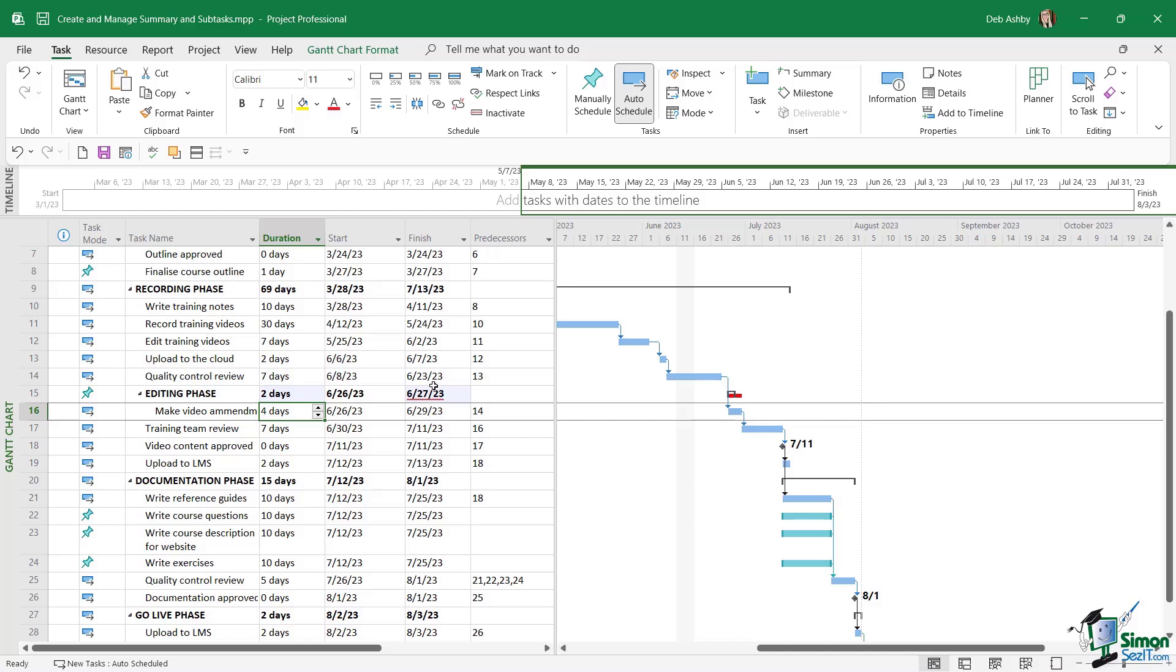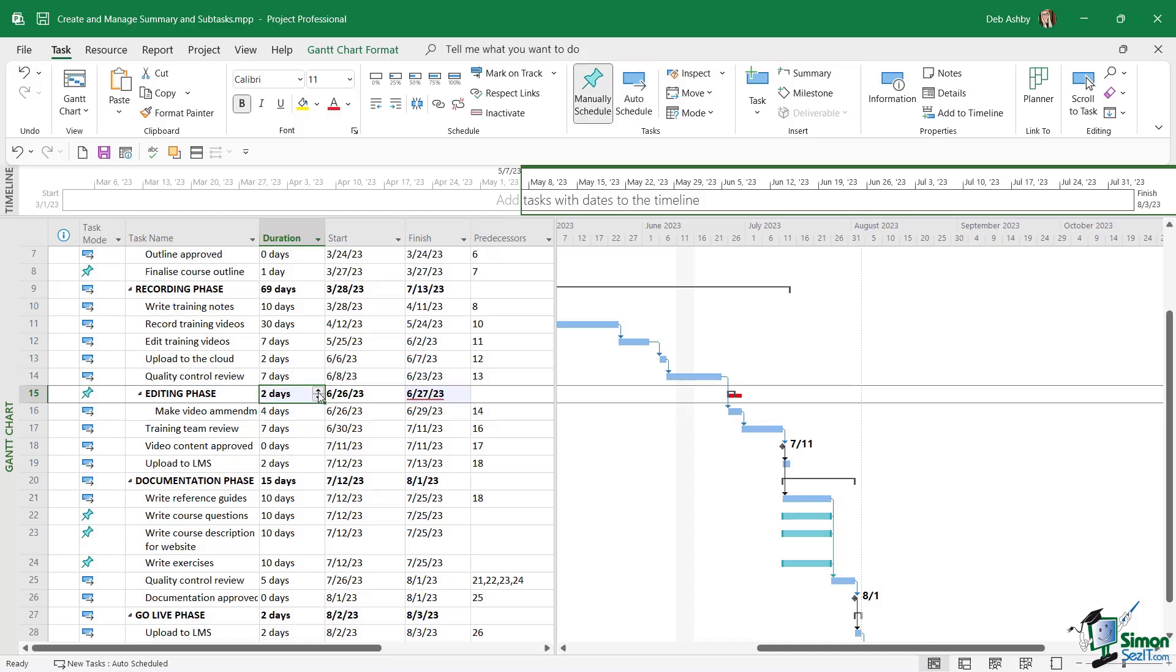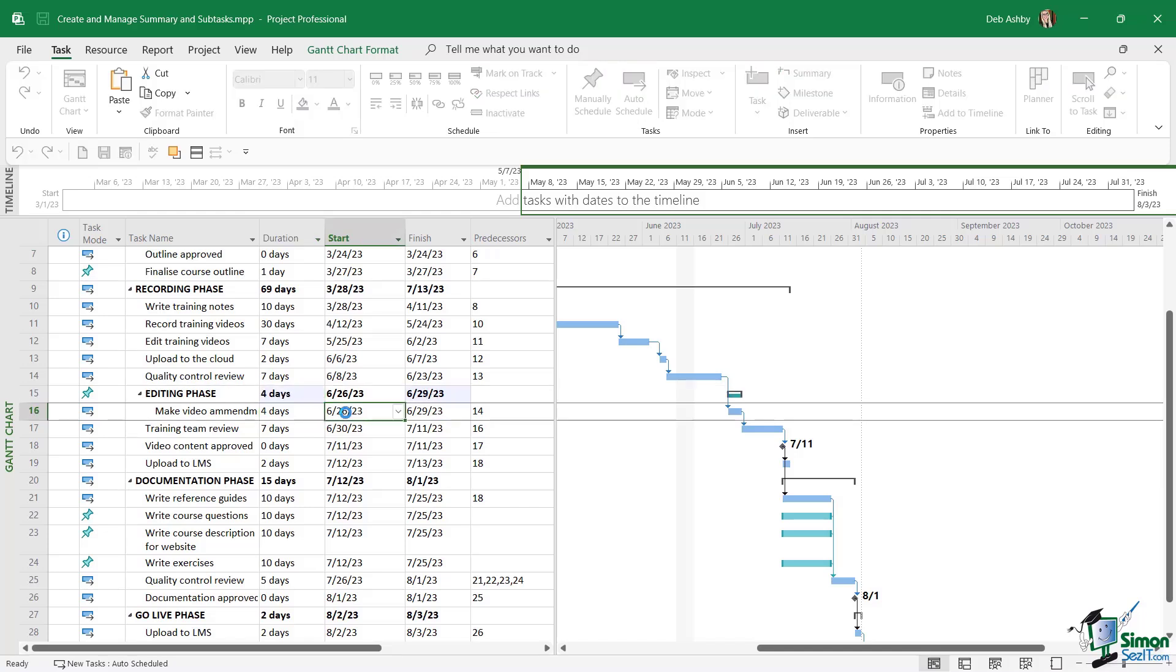And that's basically telling me that the summary task is set to end before its subtask, in this case, completes. And this is probably something that I'm going to need to look at. Now this doesn't generally tend to happen with automatically scheduled tasks. But sometimes when you're working with manually scheduled summary tasks, this problem might pop up. So it's good to know what it means and how to fix it. So now I can see that this is in red. I can see, OK, I've set two days for the editing phase, but we only have one subtask here. And that is four days long. So it's going to finish after the end of the summary task. Now I'm just going to take this back up to four, which is an easy fix.